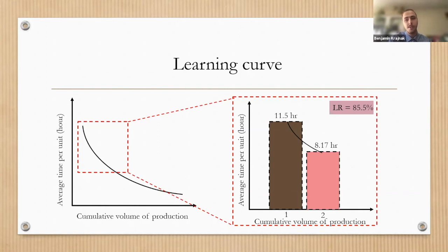That shaves off about 15% of the time that it took us to make the first unit, meaning it only took us about 85% of the length to make the second unit as it did the first unit, which as we continue to make more units, we would expect to see a similar number potentially by the third unit. We should be looking at the same 85%, closer to maybe 6 or 5 hours of production in terms of making one unit.